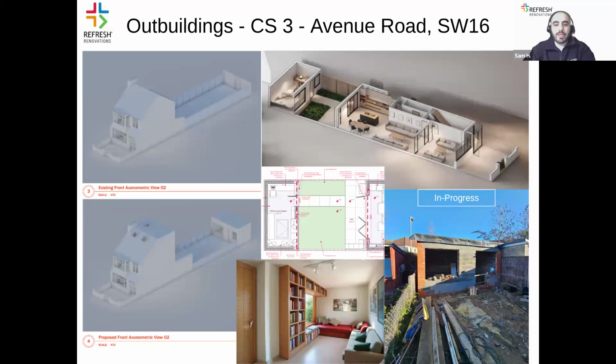On another note here, if there is anyone in attendance today considering a basement or lower groundwork, it is worth mentioning that PD rarely covers major basement excavations in London, and it is highly likely that this would need to go through a full planning application.